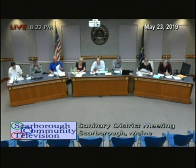All of the proposed gravity sewer, manholes, and sewer services within this request shall be transferred over to the district upon the completion of the project. The roadway will be public. Note that in future phases, the side roads servicing the back lots will remain private, but the developer is proposing providing a utility easement for both public water and public sewer. I recommend approval with the following conditions. Wastewater flow be limited to 42,748 gallons per day of typical sanitary waste.